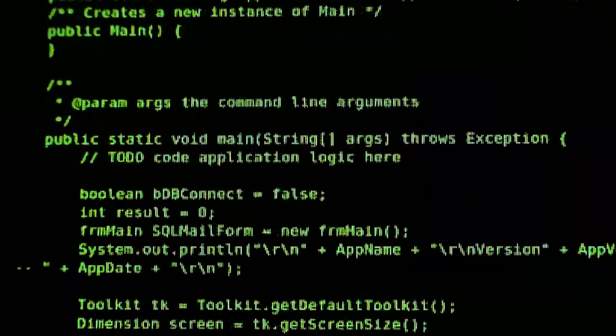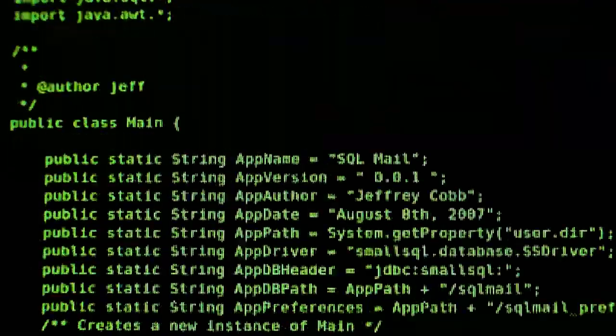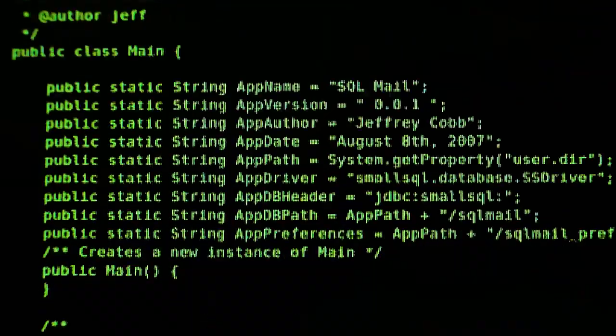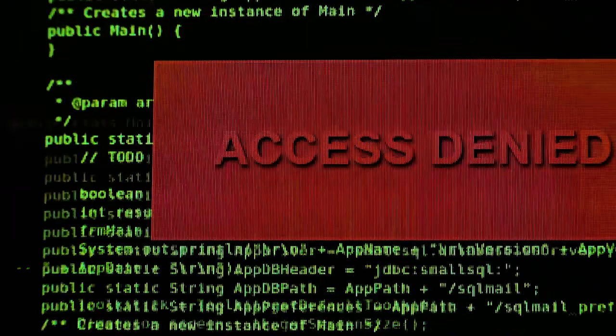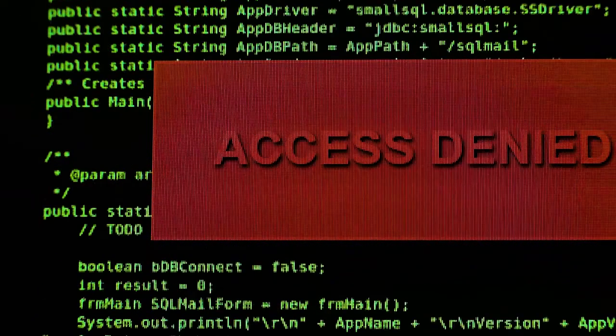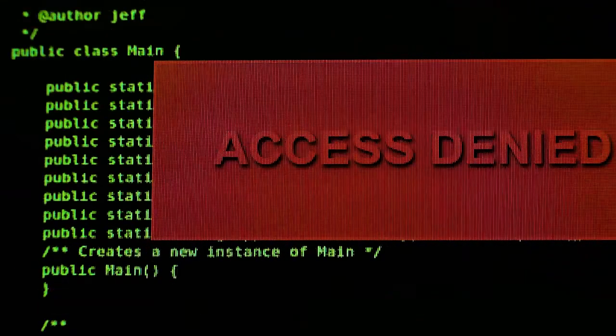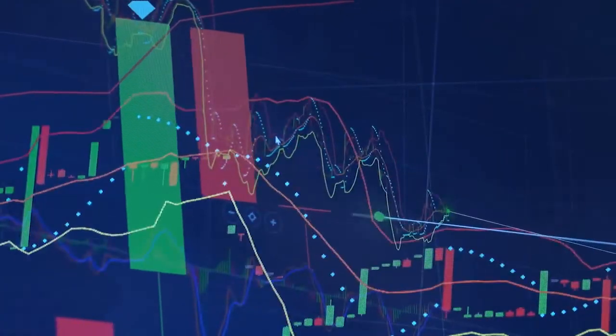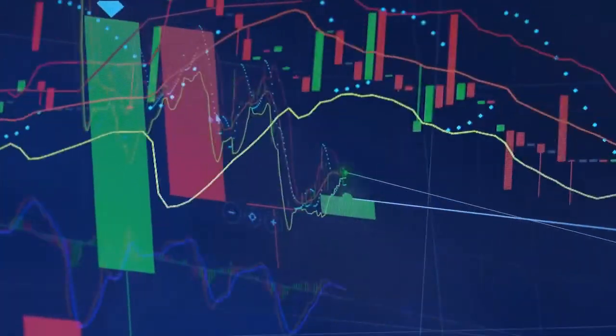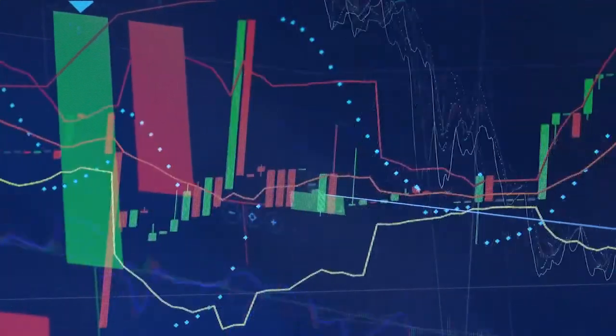Another common error is underutilizing task hierarchy. ClickUp allows tasks, subtasks, and checklists. Beginners often create too many standalone tasks, losing context. Use subtasks for campaign steps, checklists for approvals, and link related tasks to ensure clarity.